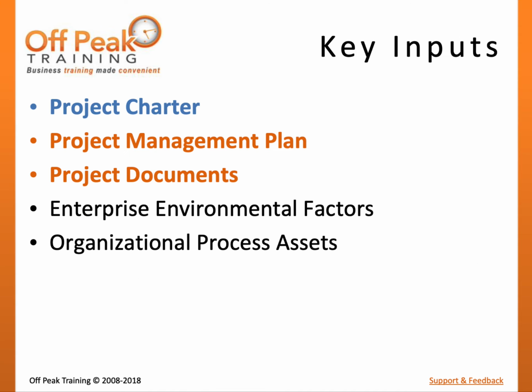The PMBOK Guide defines several inputs to the Plan Resource Management process. The Project Charter will include a high-level project description and indicate key stakeholders, high-level milestones, and authorized financial resources that may influence resource management. The Project Management Plan includes other subsidiary management plans and baselines that may help influence the development of the Resource Management Plan.